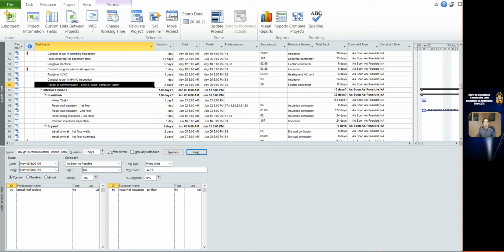Constraint is very important in the schedule development. Constraints affect the total float calculation and affect the critical path calculation. Setting a deadline date in a project provides you with a visual reminder if you don't complete a task by the deadline date that you established.